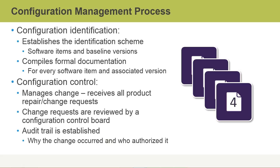Then we move into configuration control, which involves managing the changes. We receive all the product repairs and change requests. The change requests are then reviewed by the configuration control board. We also ensure that we audit these changes, so an audit trail is established. Each entry in that audit trail will include why the change occurred and who authorized the change.